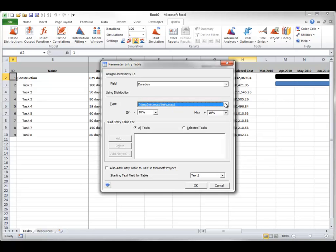You can also select a variation that will be shown in the table values when it is created by At-Risk. By using 10% below and 10% above, you are specifying that the minimum and maximum of each triangular distribution are respectively 10% below and 10% above the most likely value, which is the original deterministic value in the schedule. Once the table is created, you can edit the table values directly in Excel to customize the range for any task.